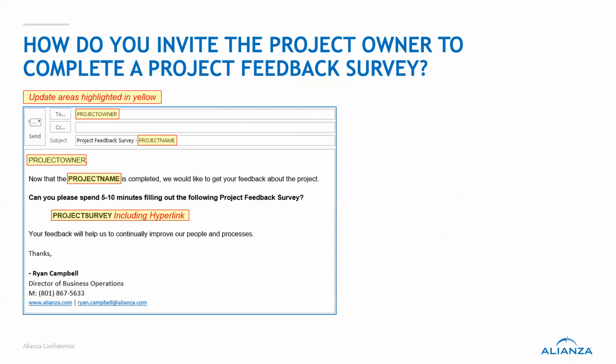One thing that I've seen working is, since we don't do surveys, we have a retrospective with the customer speaking. We understand that us being there is just to learn from their experience, not to fight back or object to their comments, because you can get into arguments and all that. But just listening as to what their experience was, why it was upsetting for them, what worked, what didn't work, and just accepting that as feedback, something that's going to help us in the future. Whatever is in the past, in the past. So it's helped just listening and getting their perspective of how things went.